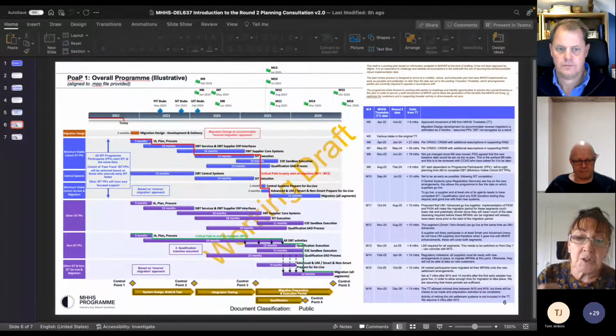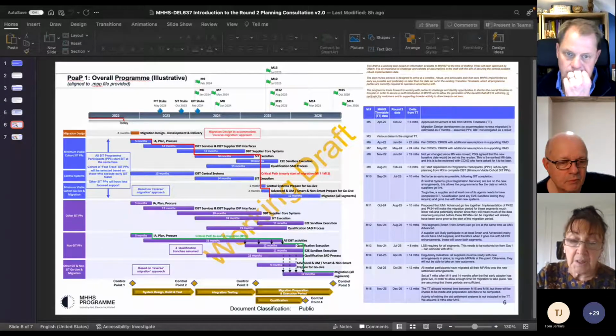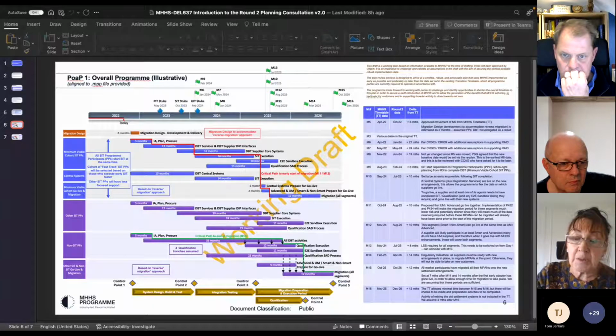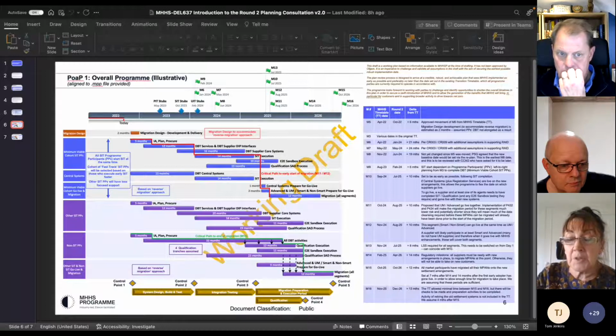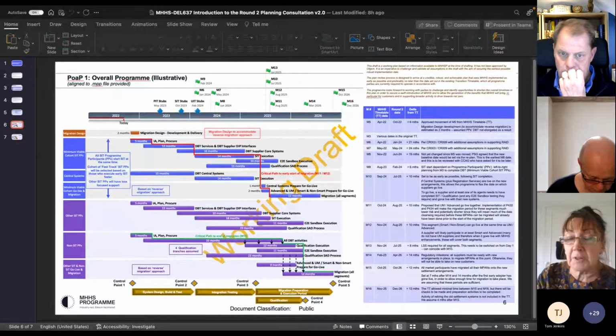What we'll do in the early stages of SIT functional is very carefully monitor how fast all the different participants are bashing through tests, because one thing that was very clear in faster switching for suppliers when they were doing UEPT, because they were working in small groups of either 2 or 3, each one was heavily dependent on the others in their group, and so if one in that group had some system issues, it was really slowing down the others.